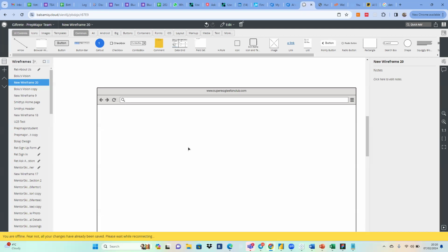Also, the prototyping technique is a very good one for sign-offs, because you can show them this and they can say, oh yeah, I'm happy with this. Then you send it to them via email so you have a written sign-off that you can go back to if anything happens in future and say, you signed this off. Then if you want to change it, you have to put in a change request, depending on what your organization does or how they treat change.